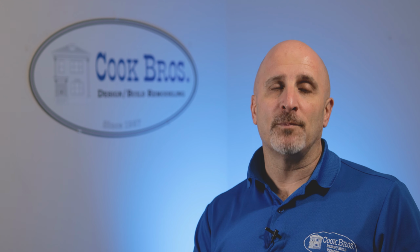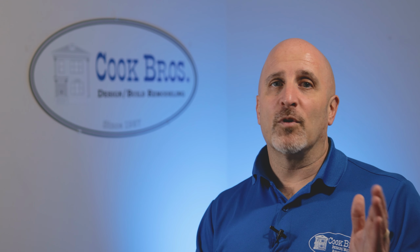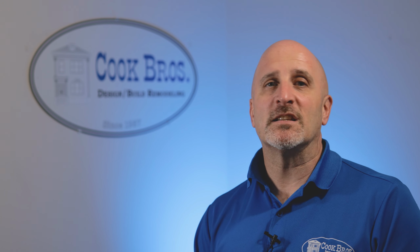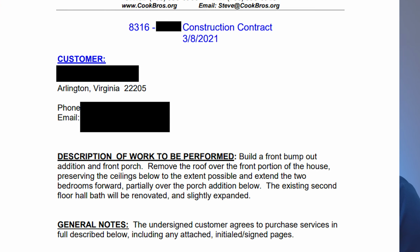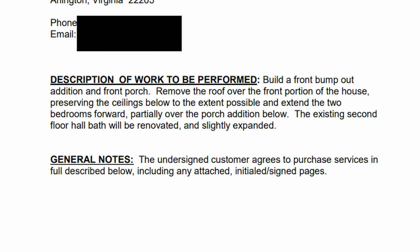It's called our additional deposit agreement. It's a $6,500 deposit, and that again brings the total deposit on the project up to $10,000. And that's applied 100% to the total cost of the project. We then develop the specifications in even more detail, which become the basis for our construction contract. Now, one of the things I feel we do better than anyone else within the industry are our construction contracts. What we do is we try to write a very detailed narrative format of exactly what we're going to do for you and how we're going to do it for you.